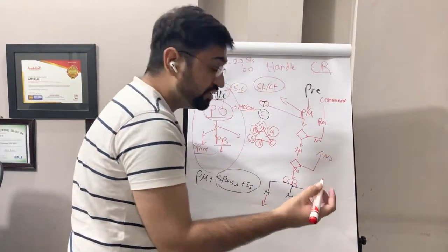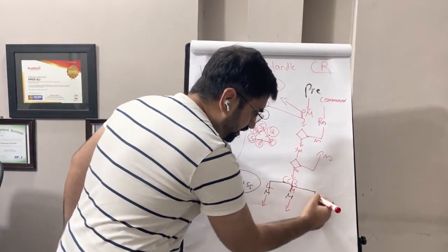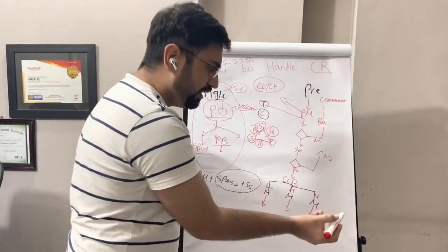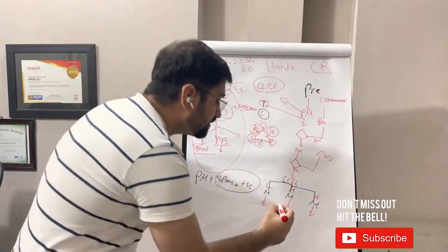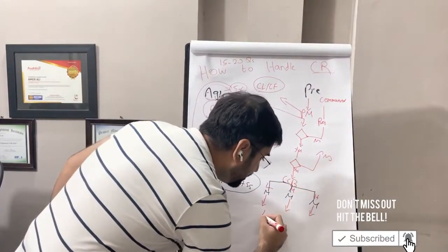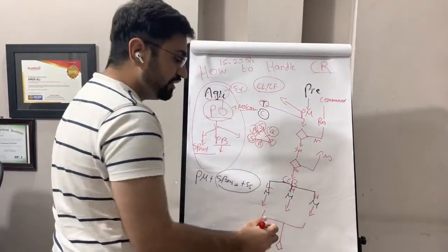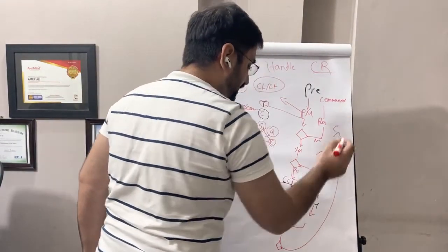If the change is very high or major, I would say low, medium, high, or minor, moderate, major, then you need the approval of the sponsor and so on. So let's say the change is approved. If the change is approved, it goes there. Again a diamond symbol is there. If it is not approved, again you just communicate the rejected change.